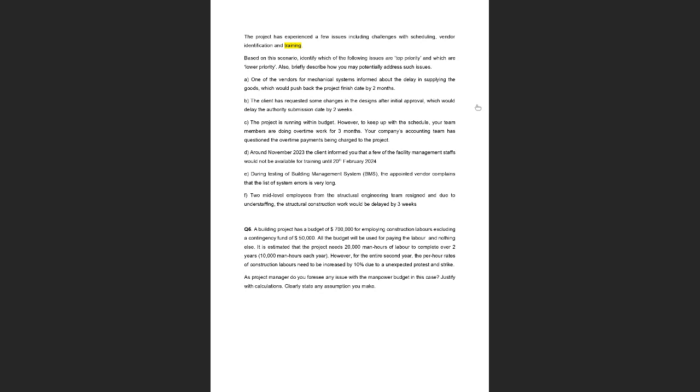So the question also says, how are you going to handle this kind of issues? In order to handle, in this case, the problem should be immediately conveyed to the client. The client should be informed about this situation. And when you inform the client, there can be two scenarios. Okay, so the client can ask you to look for an alternate vendor, so you might look for an alternate vendor who can supply this stuff on time, or the client might be okay with this delay. In any case, you will have to inform the client so that you don't have to pay the liquidated damage amount at the end when you are handing over the project to the client.